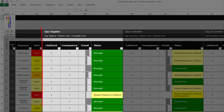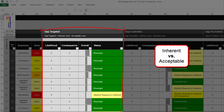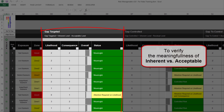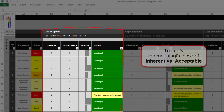The section Gap Targeted is automatically calculated and color-coded based on the settings in the Risk Parameters tab. This section compares Inherent Risk Levels and Acceptable Risk Levels, displaying explicit information about the gap which must be addressed for the likelihood and consequence of the risk. This feature will save you a huge amount of time when verifying the meaningfulness of levels entered for Inherent Risk and Acceptable Risk.